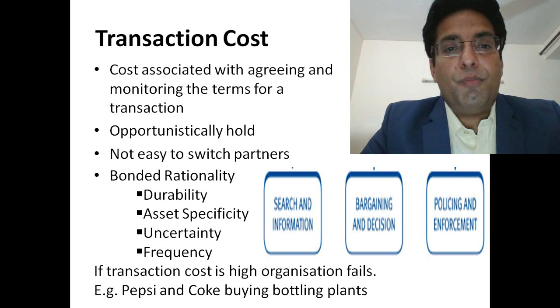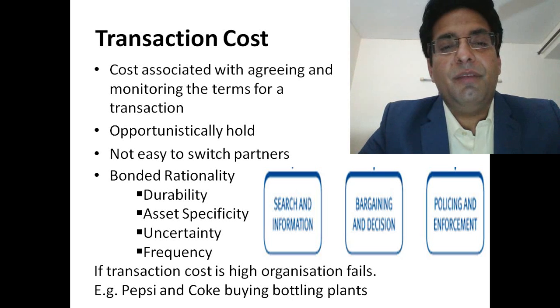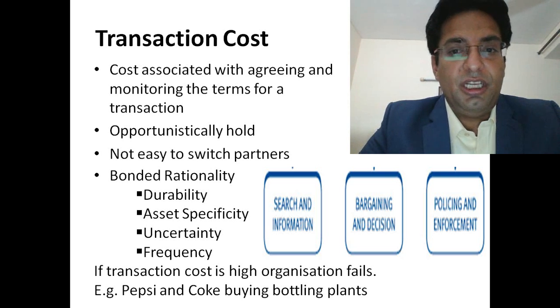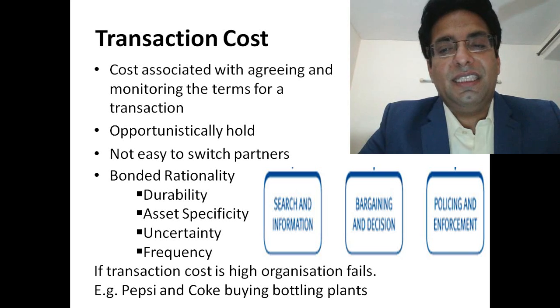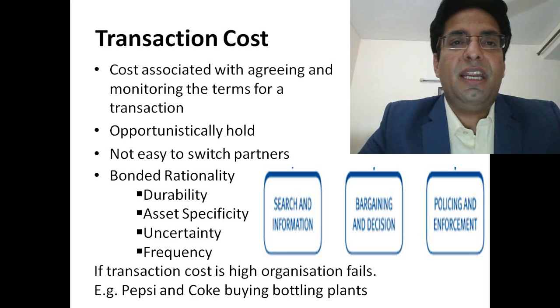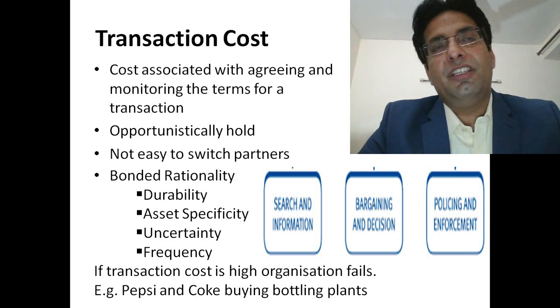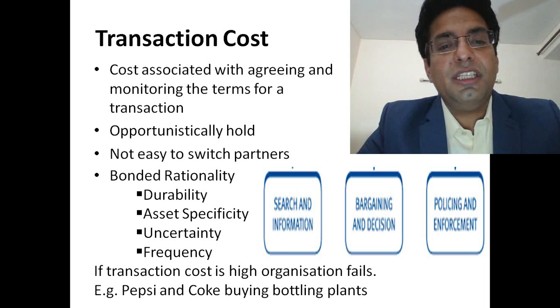There may be opportunistic cost where the organization may have the skills required to do that activity, and once they know that you are not going to leave them during the project, they may charge you higher rates during the course of the project. Higher rates can be charged not only by increasing the cost of resources, but the project cost can also be made high by delaying the deliveries from the project. So those things have to be taken care of.